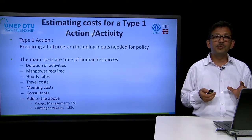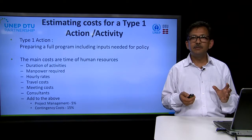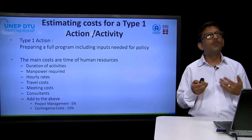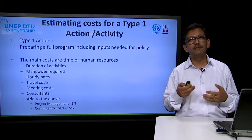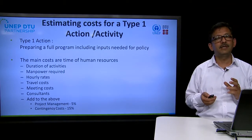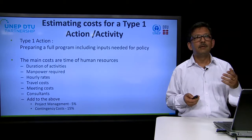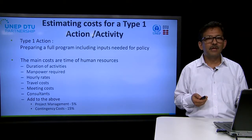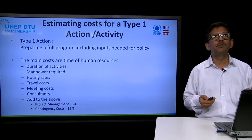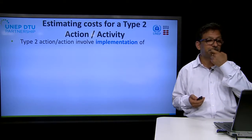We should also be aware that many times projects will run into certain delays or the scope of certain activities might change. As a result, we should also plan for contingency. As a thumb rule, you could put 15 percent of the budget towards contingency to take care of these unforeseen circumstances.